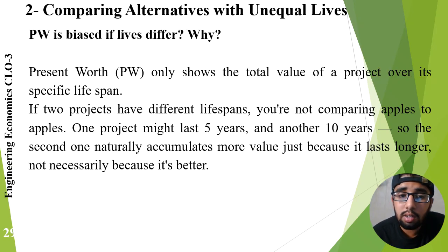Why is present worth biased if lives differ? Present worth can become biased when project lives differ significantly. A longer project may appear more attractive simply because it lasts longer. However, this does not necessarily mean it is economically superior. Therefore, additional methods such as annual worth and repeat cycle analysis are required. This technique ensures that comparisons remain fair and meaningful. Understanding these limitations improves the quality of evaluations.